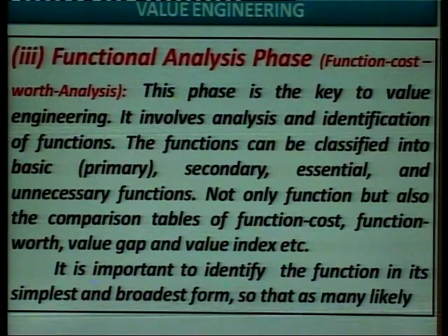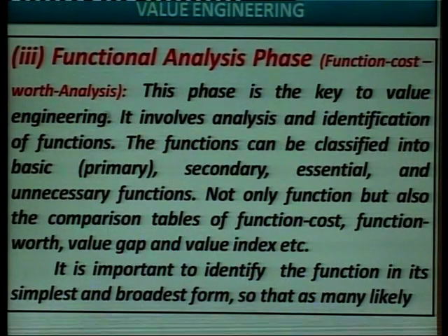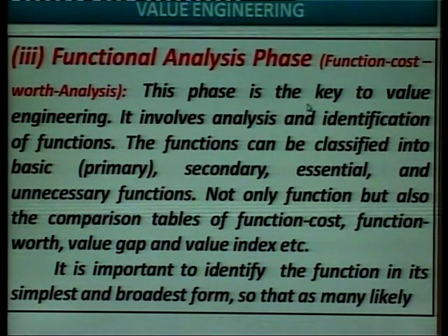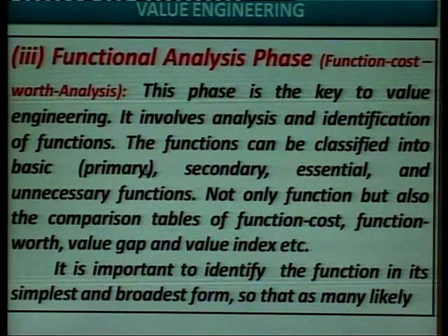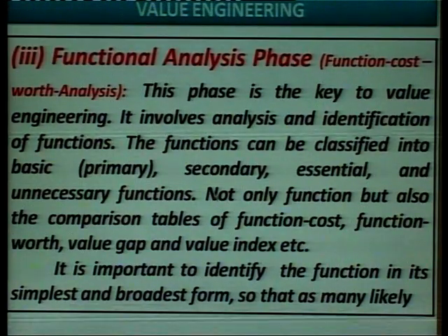Next is function analysis phase, or you can say function, cost, worth analysis. This phase is the key to value engineering. It involves analysis and identification of functions. The functions can be classified into basic, primary, secondary, essential, and unnecessary functions.